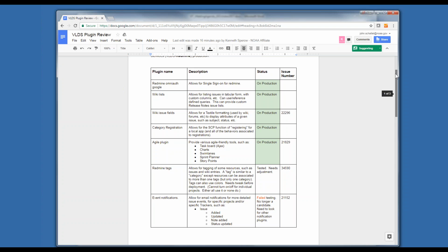holes in functionality, or a lack of functionality in terms of doing project management, is that Redmine doesn't support resource management. What I mean by that is the ability for people or managers to see how allocated users are within their projects. You do have the ability within Redmine to assign tickets to users, and the tickets themselves can have start dates and end dates, and an estimated amount of time to do the work.